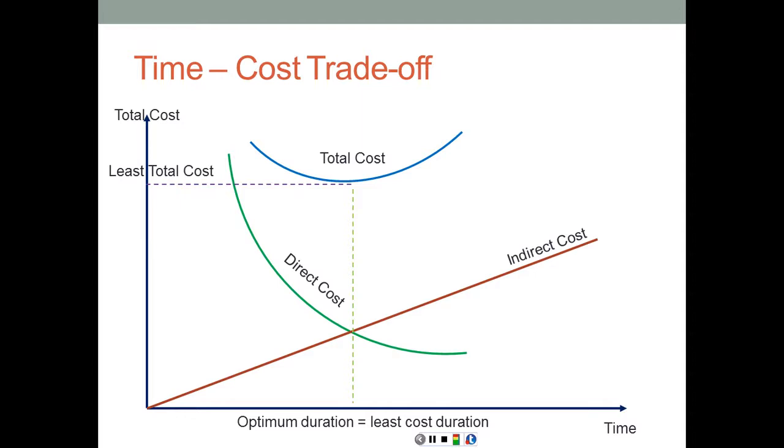But let's say we have created a new critical path, and that contained these same activities, let's say the first and the last activities, in a finish-to-start relationship with the other activities. Then the first and the last activities are still ineffective on the first path because of the start-to-start and finish-to-finish relationship, but they are effective activities on the second path because they are finish-to-start activities. So they can be used on one path and not on another.